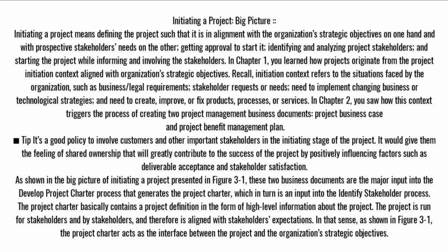In Chapter 2, you saw how this context triggers the process of creating 2 project management business documents: Project Business Case and Project Benefit Management Plan. It's a good policy to involve customers and other important stakeholders in the initiating stage of the project. It would give them the feeling of shared ownership that will greatly contribute to the success of the project by positively influencing factors such as deliverable acceptance and stakeholder satisfaction.